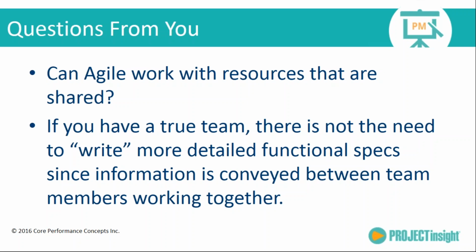For example, if there's a large project that's requiring to get into production by the end of June, and you know that it's going to take resources to make sure that that happens, what you don't want to do is have your project circumvent that large initiative. So there needs to be a communication with regard to how those resources are shared. And we all have projects that have tasks in them that can flow. It's really important to know what your critical path is in that kind of environment so that you can accurately and fairly communicate what are the tasks that really need to be done when, and that they can be part of a sprint or not.